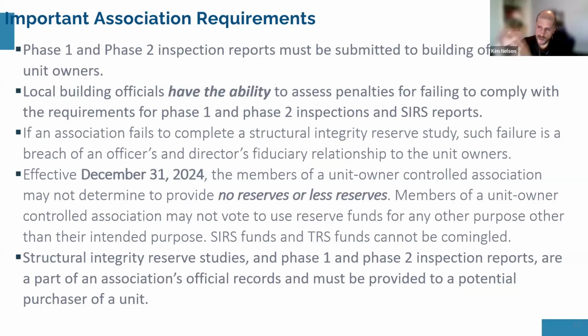And when that significant structural deterioration is fully repaired, then the milestone is considered completed and the requirement satisfied under the statute. And at that completion date, you then begin your clock for the next 10 years, where you'll be required to do it again. So that's the breakdown of milestone inspections into their phase 1 and phase 2.